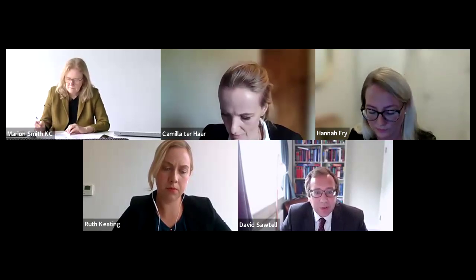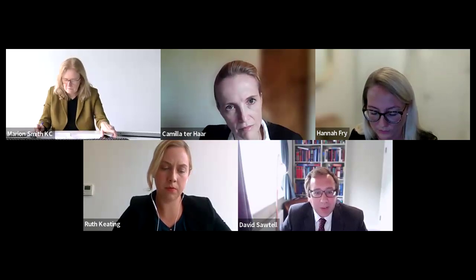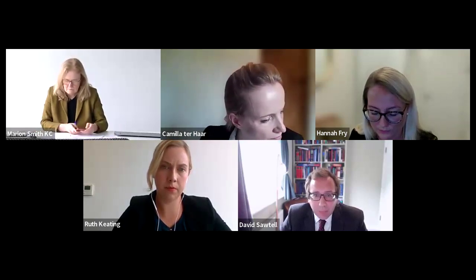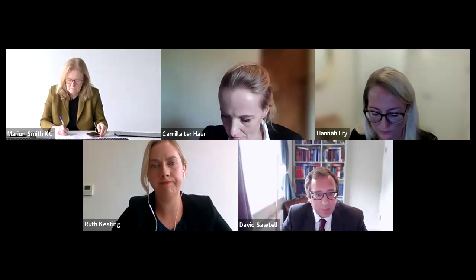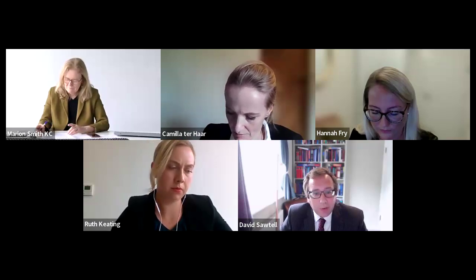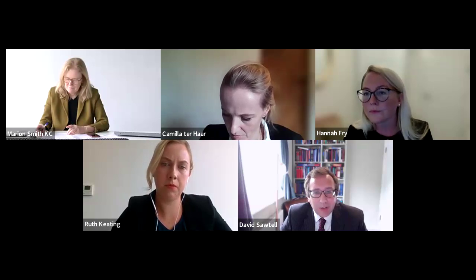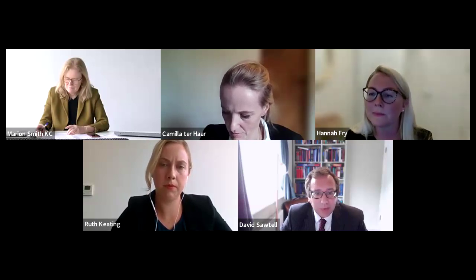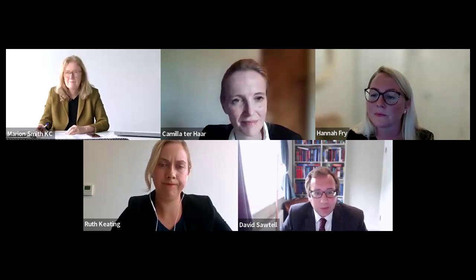So we have a new Article 7, so you have to identify the principal contractor and the principal designer under the Building Regulations 2010, but it says nothing about what they're supposed to actually do. That's left to the regulations themselves. You have a clause 2.7.2, which makes the employer obliged to comply with Regulation 11A of the Building Regulations 2010 in terms of competence. But again, there's no content to it. It just simply says you have to do it.